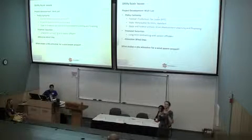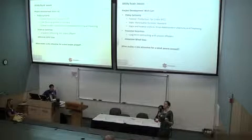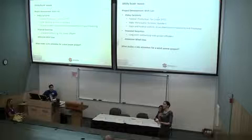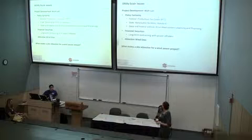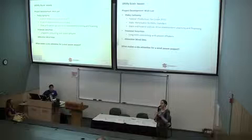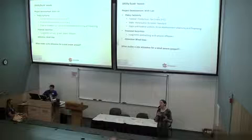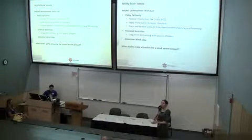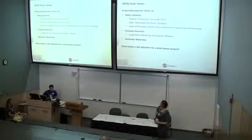And that's where we would say, this site is so great, it's going to minimize your risk and all the other elements of development. So this is really a pretty secure investment, even given the financial uncertainty that's being caused by the policy variables. So I'm going to walk through what makes a wind site attractive, but the real take-home message here is that without the security of a long-term power purchase agreement, so if we can't sell our power for about 20 years before we build the project, the incentive for us to invest is really hard to argue.